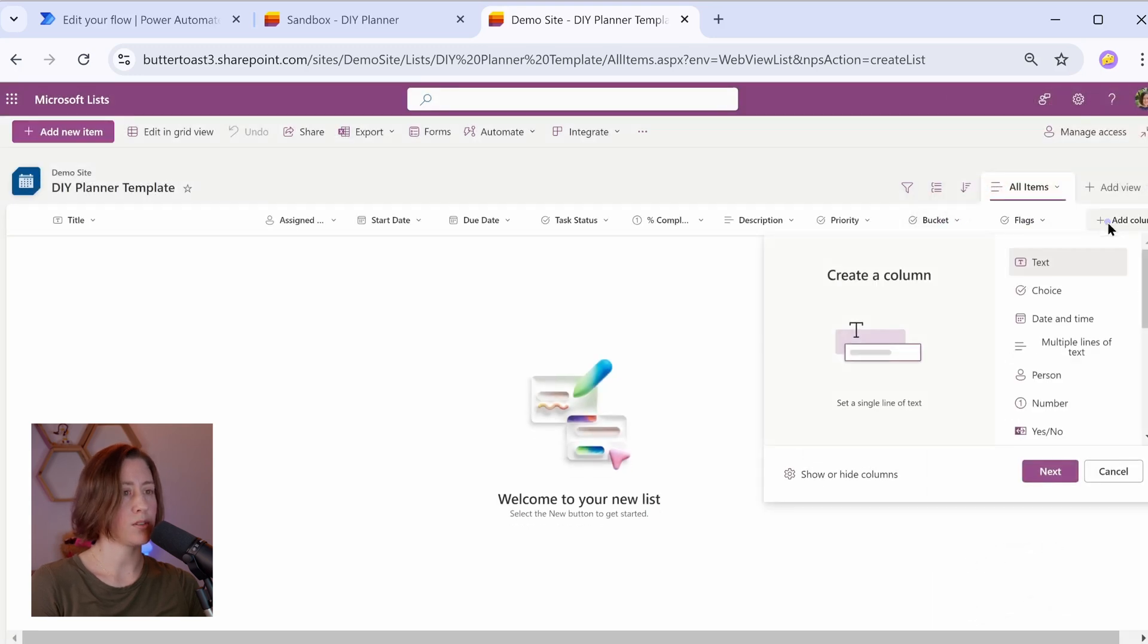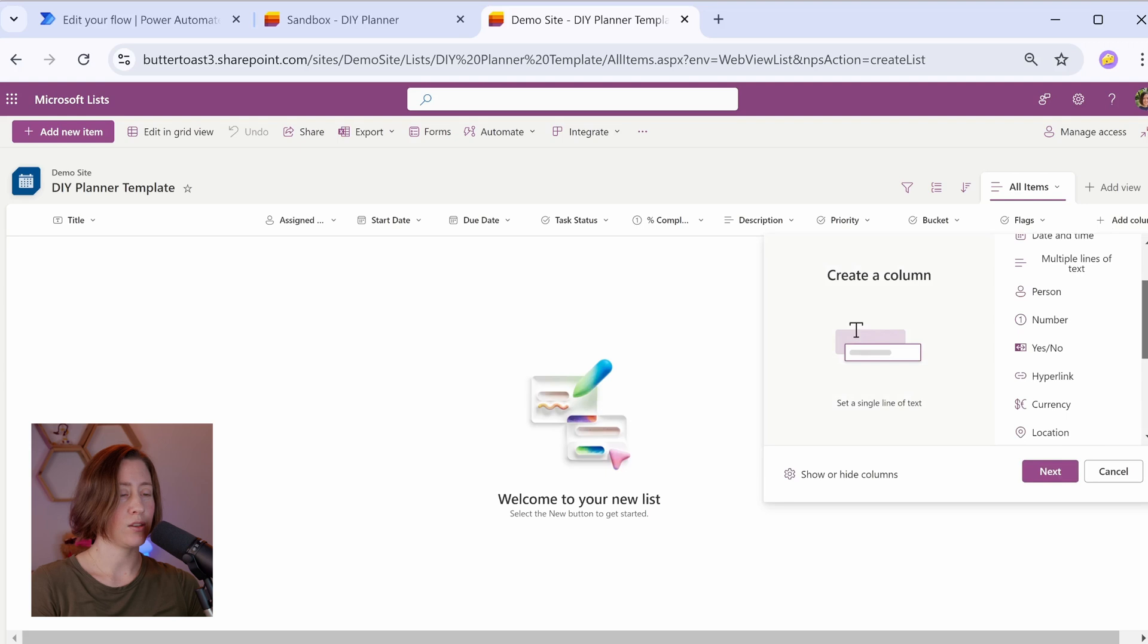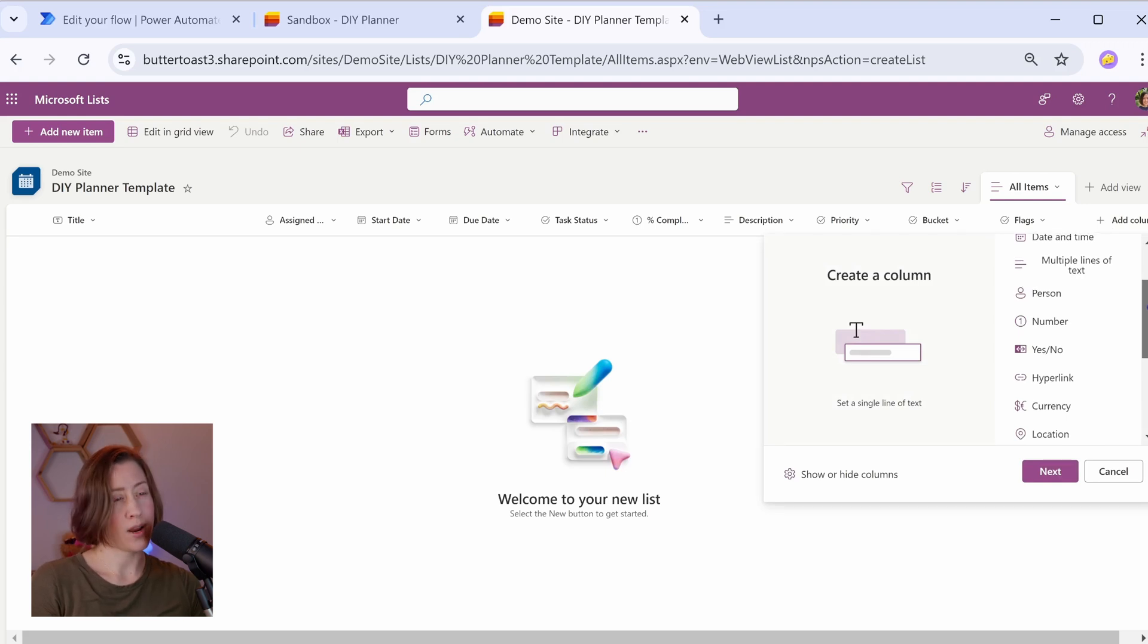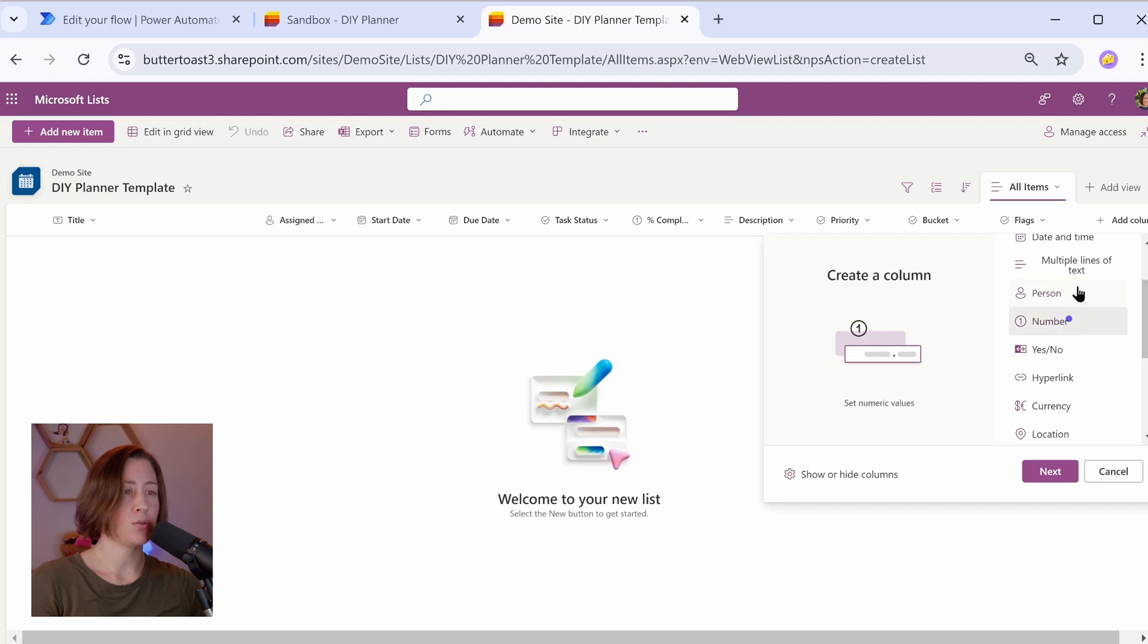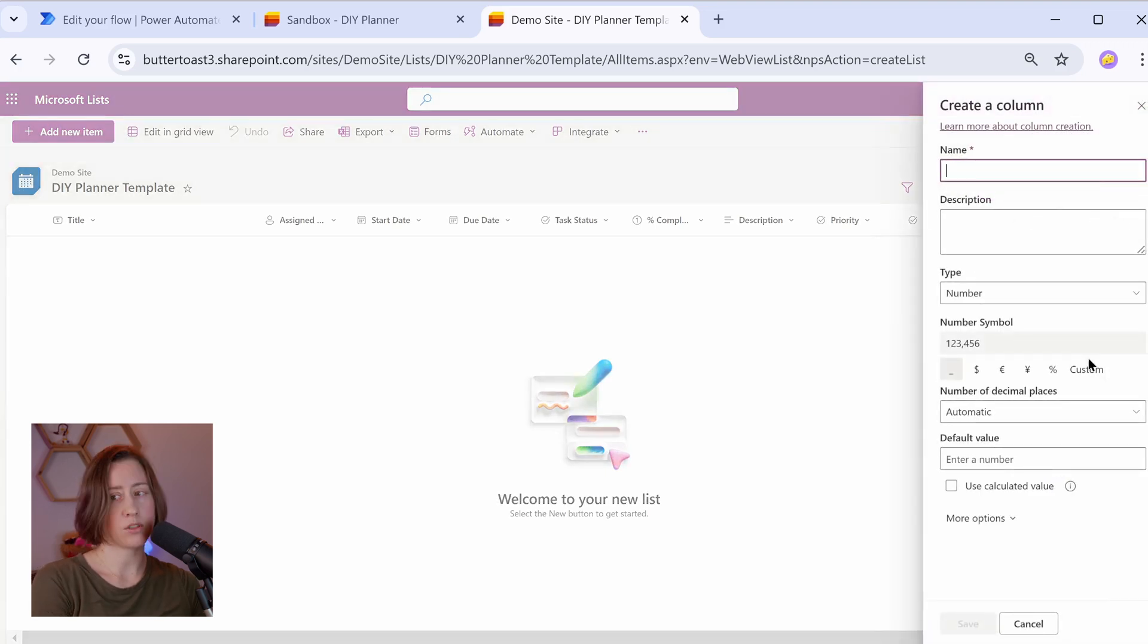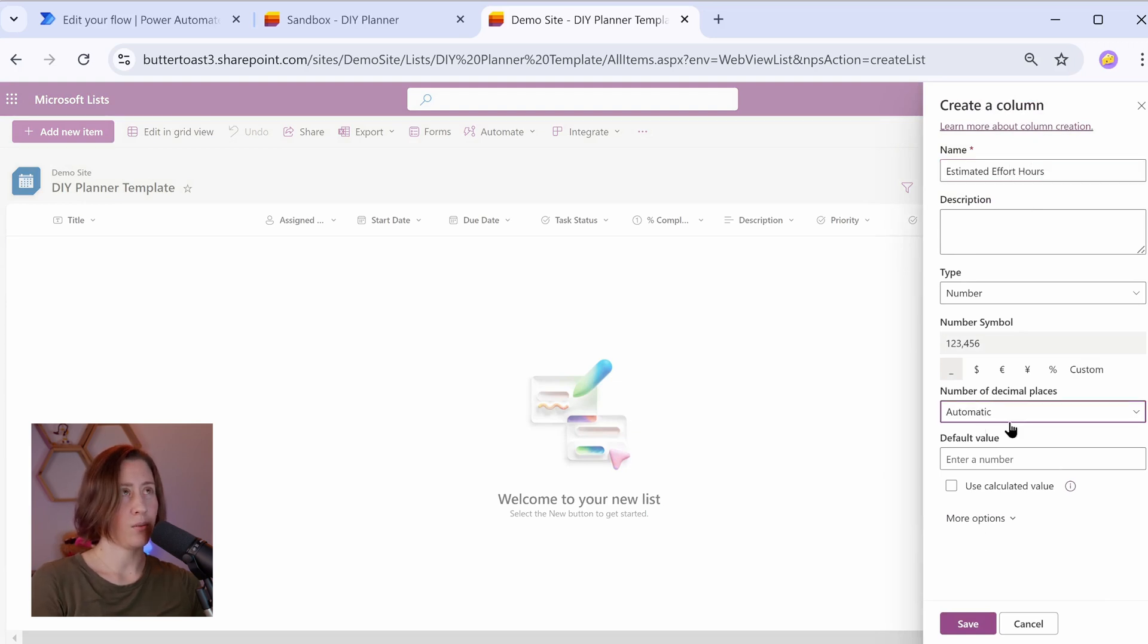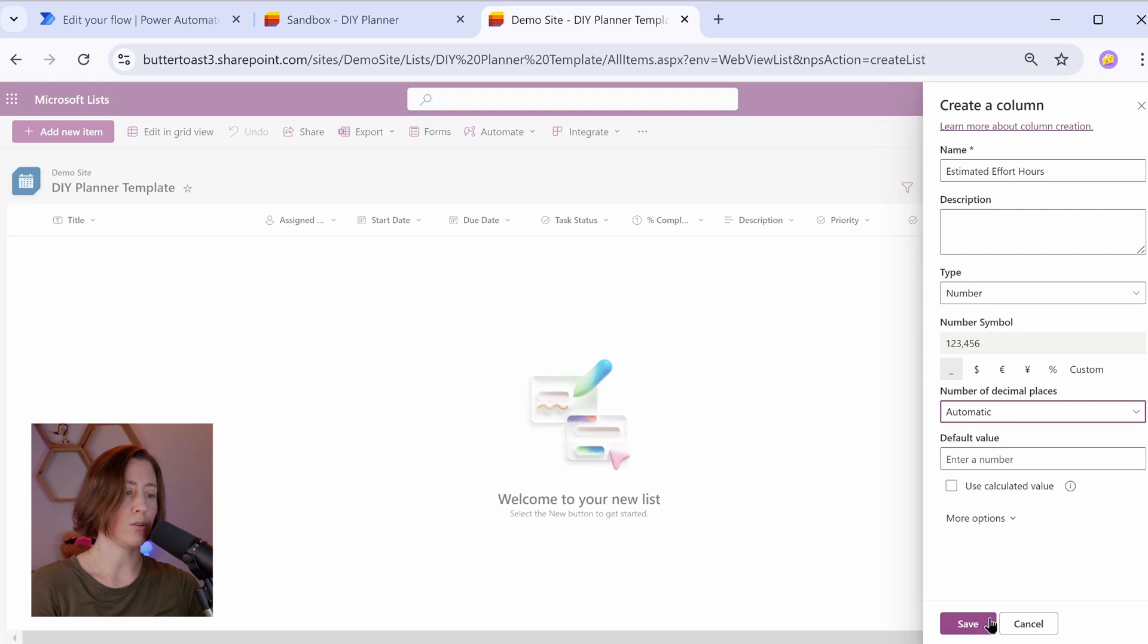All right, onto our custom columns. So we can do estimated and actual effort hours here if we want to, we can do whatever we want. We can do t-shirt size for sprint planning, or story points, anything like that. So I'm going to do number type for this. That's going to be estimated for hours. You can choose if you want a decimal or not here. I want to point out that when the data comes out the other end, it often has a decimal anyway. So this is just whether or not it's showing the decimal in the UI.